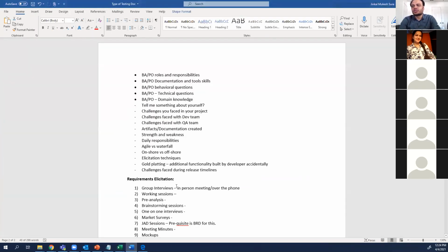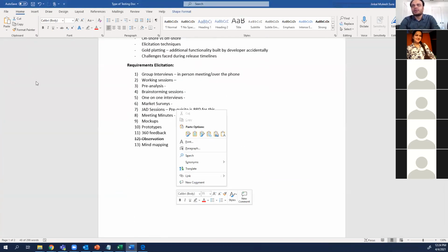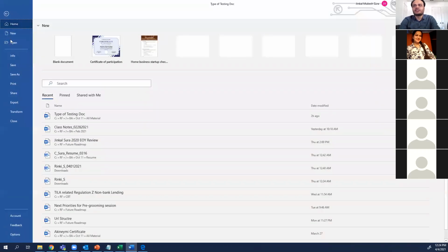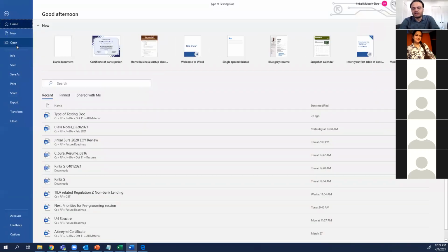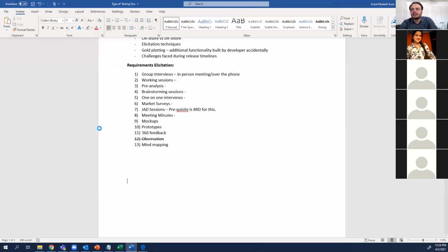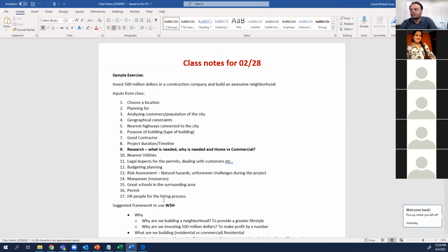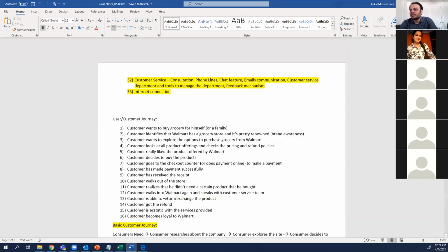You just need to know this framework. When you start working with people in the company, they'll help you fill in this information. But you should ask these questions: what is the cost? What is the timeline shift we are looking at? How many customers are being impacted? And you have to ask this of your business owner, right? Because they will know how many customers are being impacted by this.